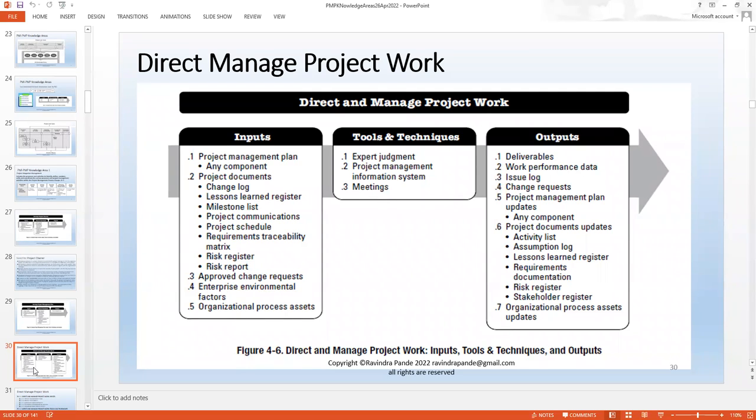So if Ravindra is allocated on a project called enhancing attendance management system, they'll make sure a standard cost has been allocated to the project, so that for a given day, you can see how much revenue has accrued depending upon the resources attached to your project. So the more resources, the more hands you have at your disposal, but still the more cost you are incurring. And as you know, every project has a specified budget, right? And normally that is referred to as a fixed price project. There are projects called time and material.